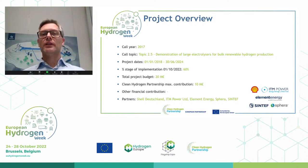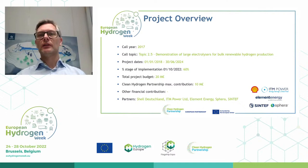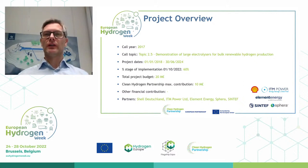The project was part of the 2017 call under the topic demonstration of large electrolyzers for bulk renewable hydrogen production. So, started beginning of 2018, and formal initial end date would have been end of this year. I'll come back to sort of delays and COVID, all that. So we are now expecting an extension until mid-2024 of this. Total budget is 20 million euros, and the Clean Hydrogen Partnership funding is around 10 million euros. Again, come back to the percentage of implementation where we are in the project, but to follow the template here, we would say we're around 60% on completion of the project. Next slide, please.